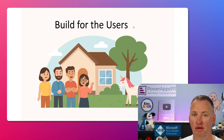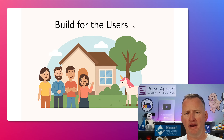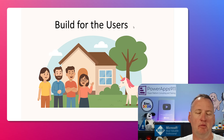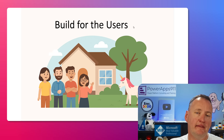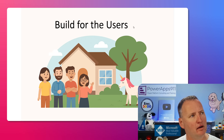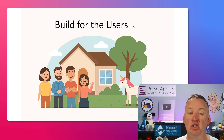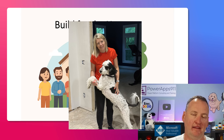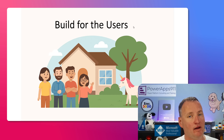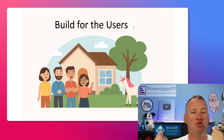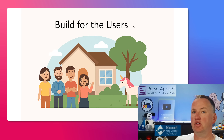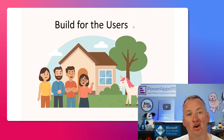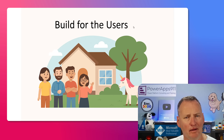My number one thing I think about here is responsiveness. If you ask someone, should the app be responsive? The answer is always, of course it should be — every app should just work on my phone, my tablet, and my desktop, no matter what. Okay, but that quadrupled your quote. And in reality, you're never going to use this on your desktop. Just because you can do something doesn't mean it's a good idea. Just because you can teach a bear to dance doesn't mean you should.